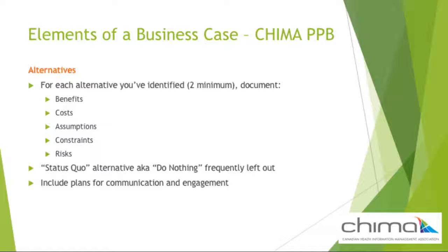When looking at costs, make sure to include any additional tasks which will be required by the new process. They must also be costed and included when developing your financial approach. There are many financial measures which are used in the business case, and we'll look at one of them, return on investment, in the next slide.